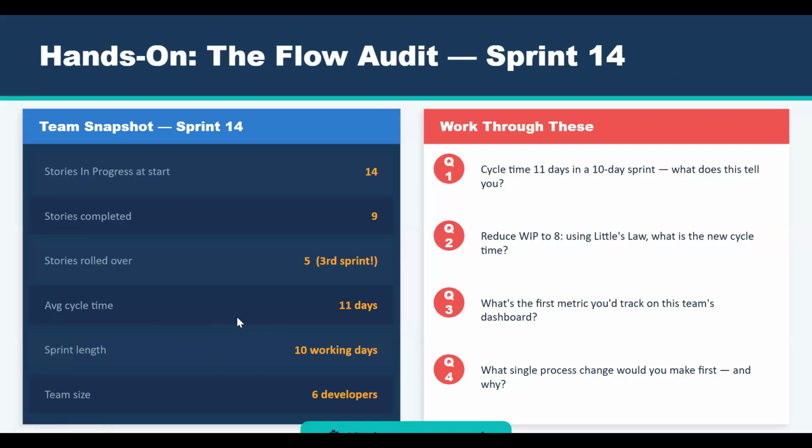No, we have 10 days of sprint, right? Exactly. Number of stories completed is 9, right? Yeah, the team completed 9 stories. The number of stories completed divided by number of days for sprint, then only we can get the average cycle time, right? No. Cycle time is the time when the work is started and when the work is finished. Only the completed stories are 9. 14 are in progress. That means a few stories just move to the next sprint because of the length of the stories.